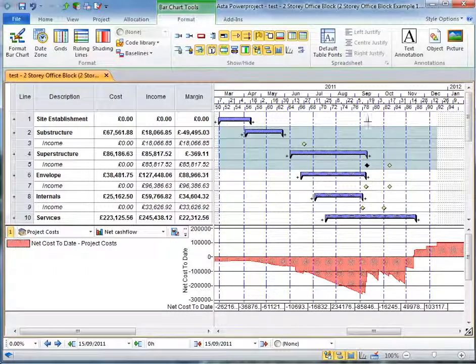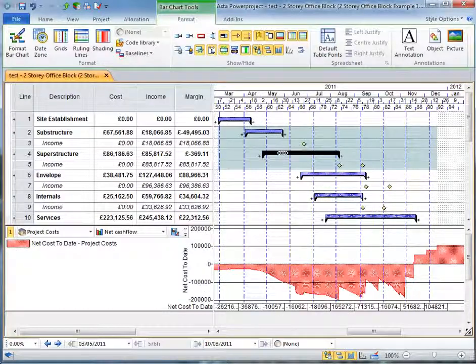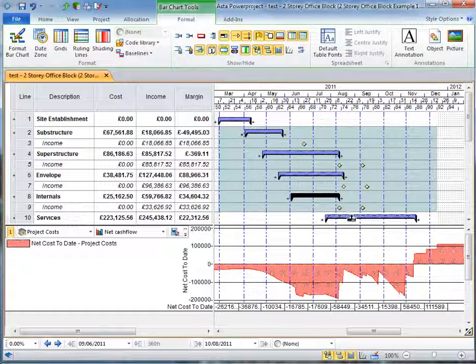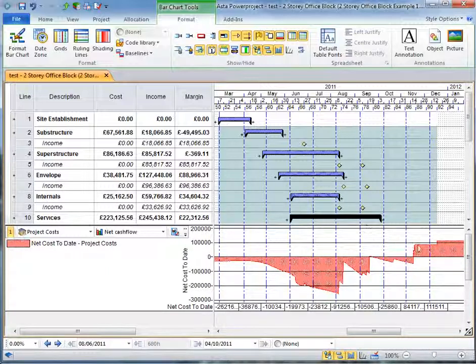And obviously the really useful thing here is that if items move around, so does my cash flow. And this can be really critical when you're comparing how the job is going, the progress, what effect this is having on us borrowing money. So if we're late on very profitable items, it's going to have an effect on our cash flow. And that's the ultimate aim of what we were trying to achieve in this video by loading our project with costs, comparing them to what we actually did, and then loading in our income to see our cash flow.